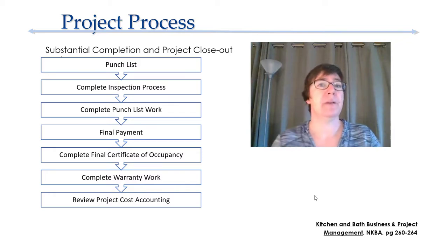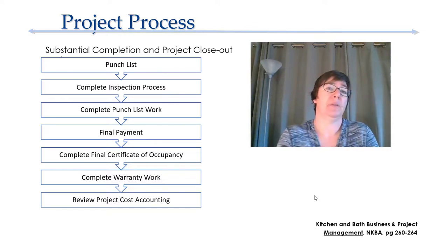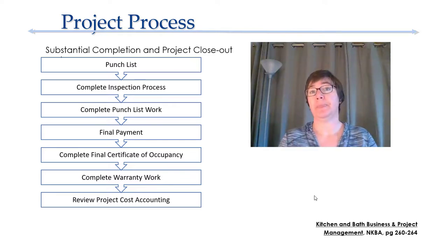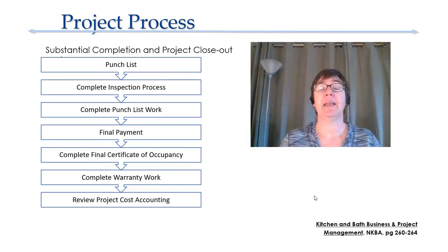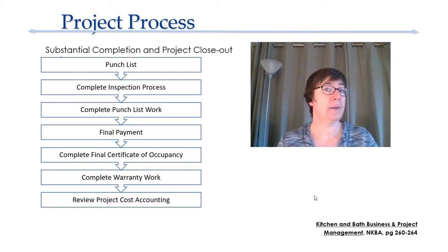And one important piece to note, a lot of people forget about, and it's a really good business practice, is to do a post-project review. This is an in-house review. What were your expectations going into this project? And what lessons learned did you find out as you were going through the project? And finally, a cost accounting. When all the numbers are in, did you actually make money? Why or why not? And what could you do differently next time?